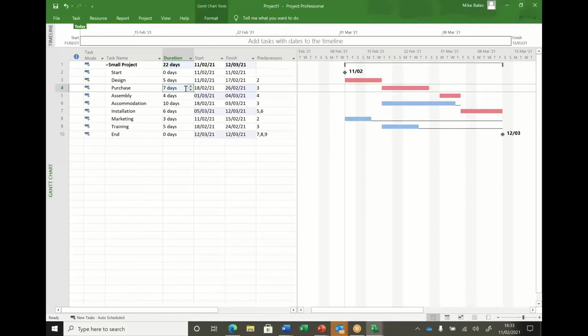You can see that 1 day overrun has integrated a day's float on the accommodation. If you look at the accommodation, that's gone blue and it now has a day's free float as a result of the move in the critical path. That's one of the advantages of the software: it's easy to communicate. We can ship it into Excel, we can PDF it.